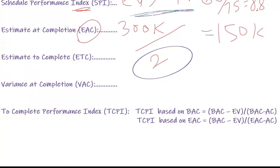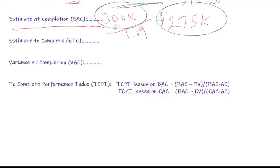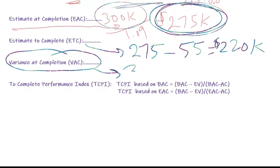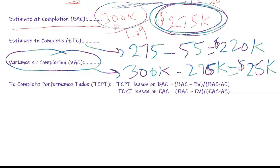If we're only going to spend $275,000, how much more money do we need? The estimate to complete (ETC) says we're forecasting $275,000 and have spent $55,000 already, so we need another $220,000. Based on this forecast of $275,000, the variance at completion (VAC) is the original budget of $300,000 minus $275,000, giving roughly $25,000 — that's how much money would be left at the end.